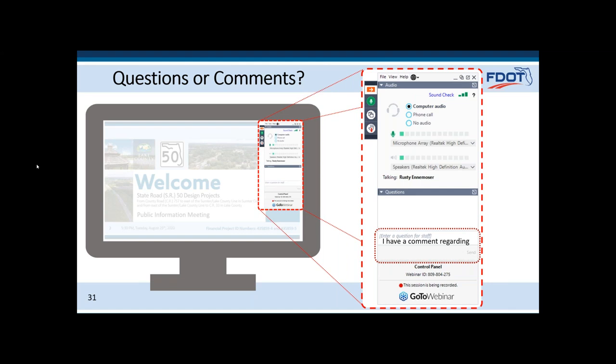Yeah, I can take care of this. Right now, the schedule shows that the right-of-way acquisition process would start, I believe it's in about a year, but that is what's scheduled. It's very dependent on the funding. Until the funding is acquired, there won't be any right-of-way acquisition. And during that process is when we send out the notifications, and the appraisers and the people who purchase the right-of-way would be in touch with the property owners at that time.